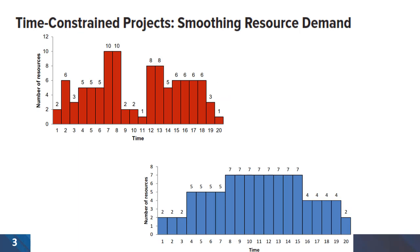As you can see in the red graph, we have time constraint projects with fluctuations in resource demand. In the bottom graph, we have done resource smoothing to make management of resources more feasible.